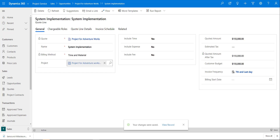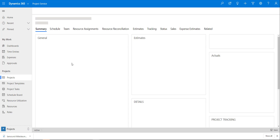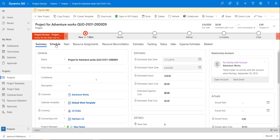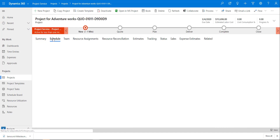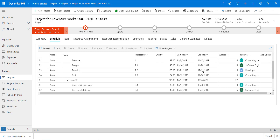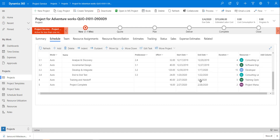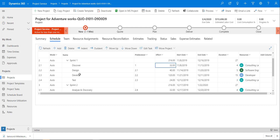Now I want to go to my Projects and update some of the project tasks. I'll open the project and navigate to the Schedule, which is the Work Breakdown Structure. It looks like the WBS has finished copying from the template. From here I can adjust effort hours, change the types of resources needed for each task, add tasks, or delete tasks — all directly within this view. Once done, I save the project.